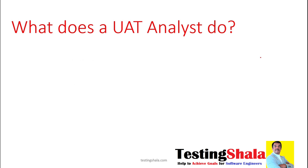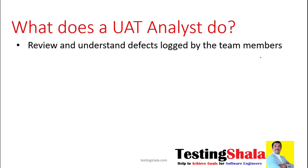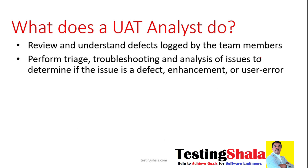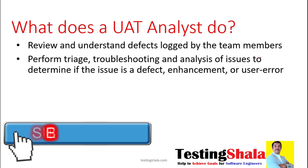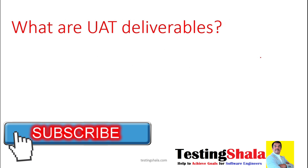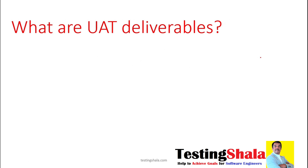What does a UAT analyst do? The main role of a UAT analyst is reviewing and understanding the defects logged by their team members. They review all the defects, perform triage meetings with different people, gather information, and do troubleshooting and analysis of various issues to understand whether the issue is really a defect, an enhancement, or a user error.